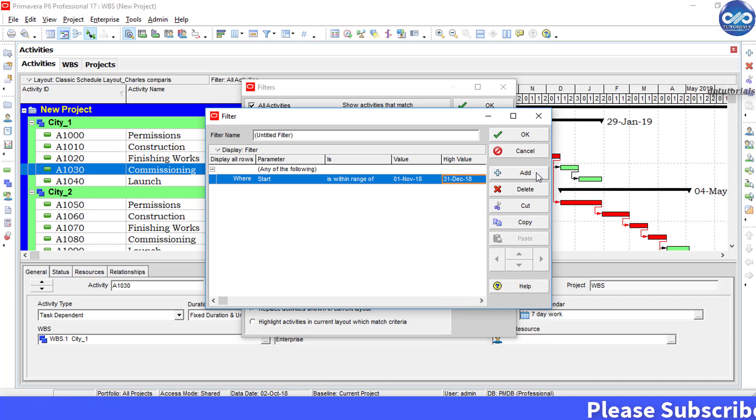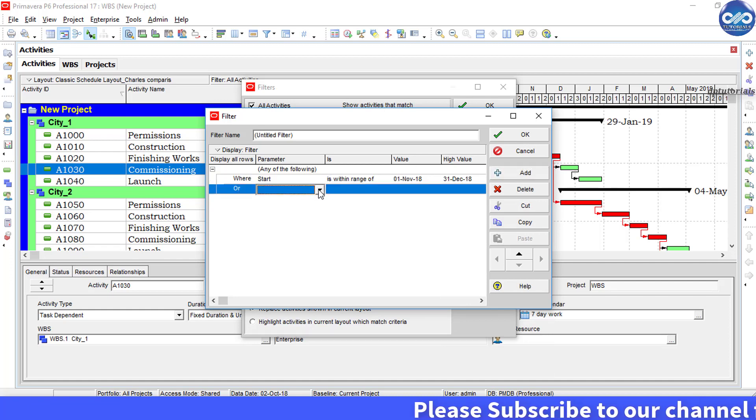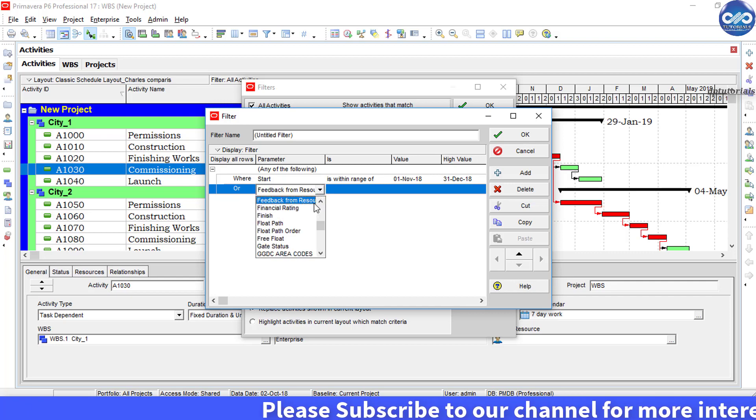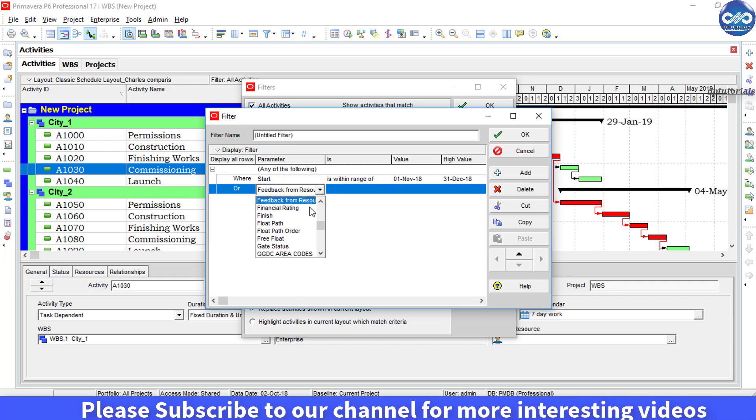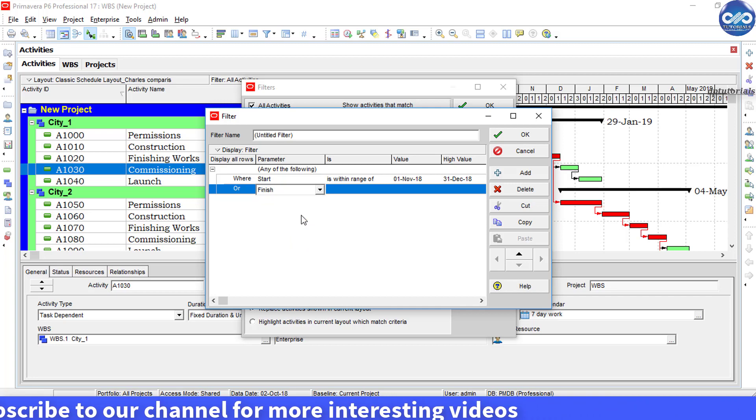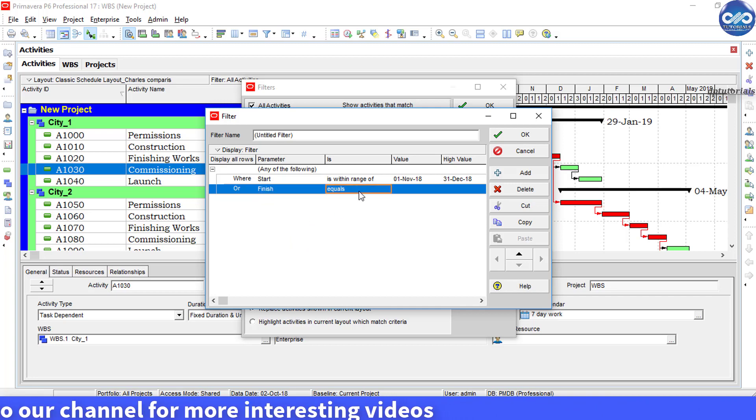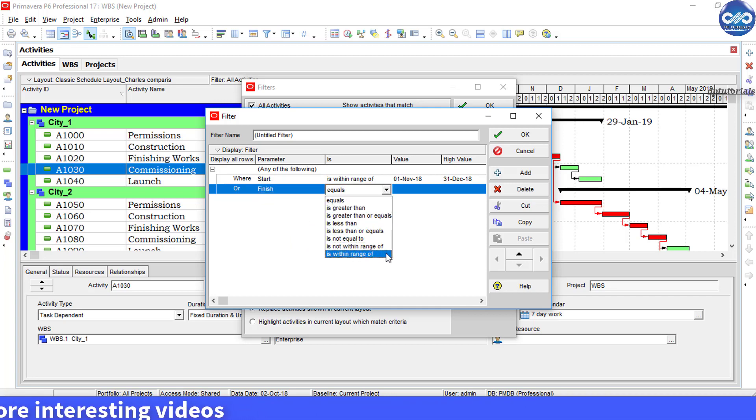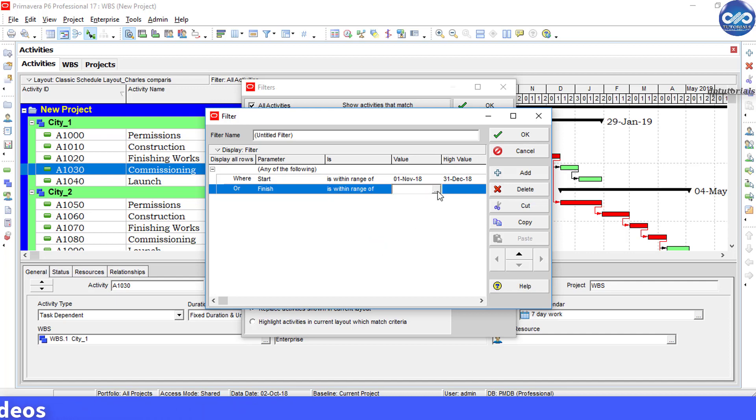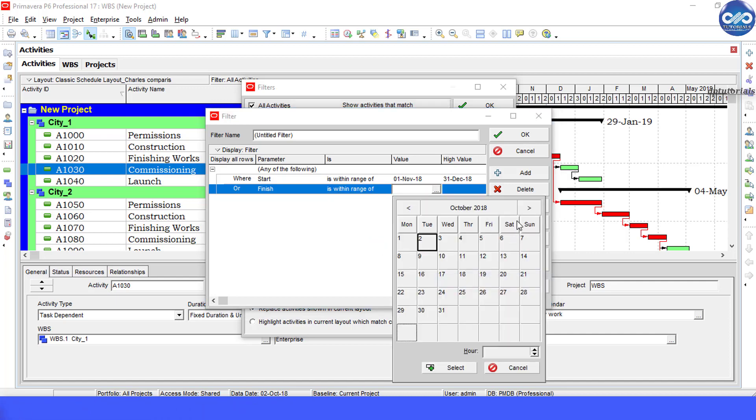Now click on the add button to add one more line item. Under parameter select finish, and select is within range of. Under value select custom date and select 31st December 2018, and click OK.